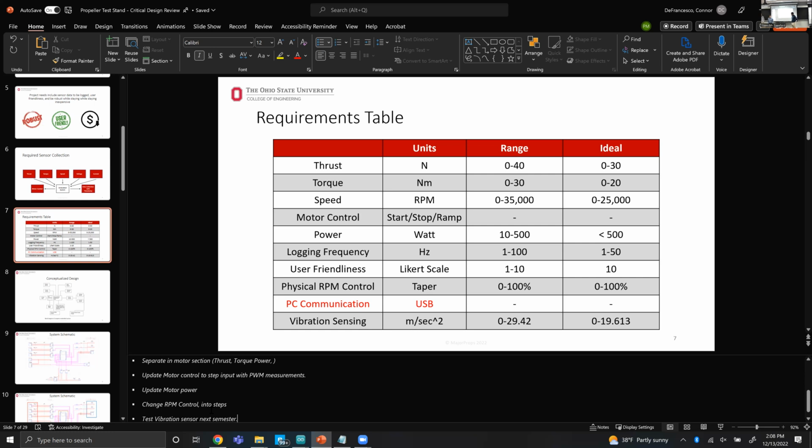You could create boards like Aero, ECE, mechanical, and put the main task that you want. You can put a due date, and you can put a checklist on there, so once they're done, they can check it. You can see their progress that is related to you. It's not all of their tasks. So you basically flush out what connects to your performance, and then you have all of yours. They can look into it. It's fine, right? Instead of running to Trello.